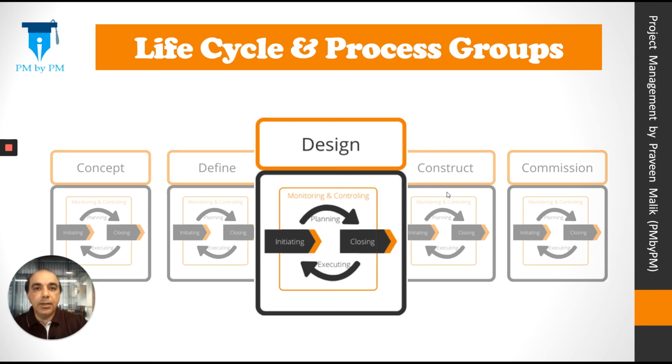So what does it mean? It means that the design phase will start with some initiating activities. For example, announcing it to the world that we are starting the design phase, holding a meeting for the announcement, sending a formal document to customers and the other stakeholders saying that we are starting with the design activities.